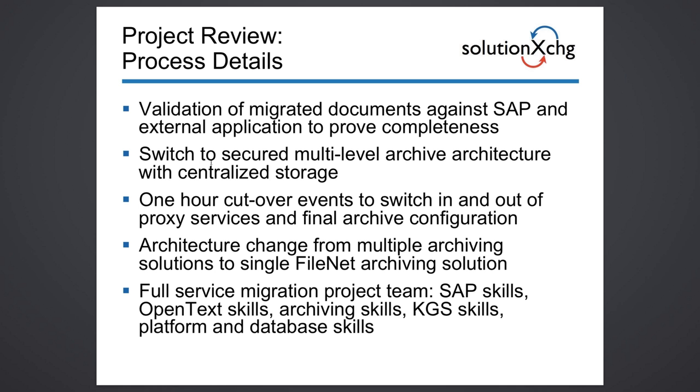But we managed to do the whole migration of these two systems with a downtime that was less than 2 hours, and that downtime took place at night during the regular maintenance windows, and as an end effect, we basically had no downtime whatsoever noticeable for the end users.